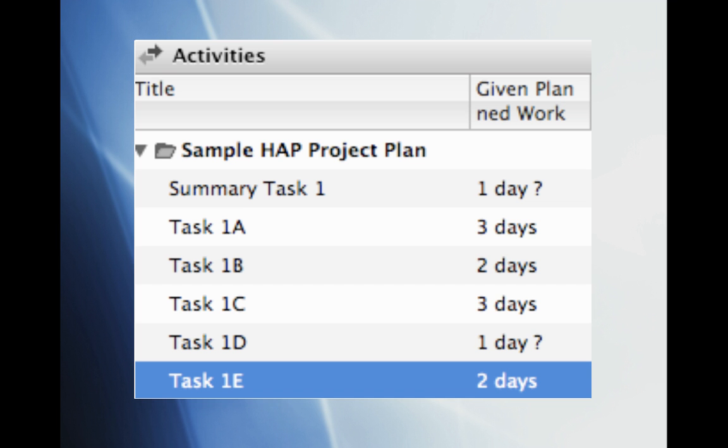We'll continue to add new tasks until we have all 5. Name the remaining tasks Task 1B, 1C, 1D, and 1E. 1B will have 2 days to be completed, 1C 3 days, 1D 1 day, and 1E 2 days.